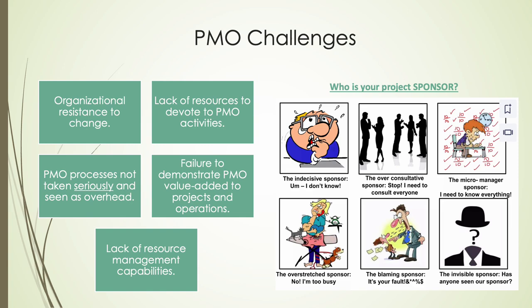Another challenge is sponsor stereotypes. We've all faced these sponsor archetypes. Like the indecisive sponsor, "I don't know," and the solution for this is to offer data-driven recommendations. The over-consultative sponsor, "let's ask 50 people," and this won't end, then the solution is pre-aligning with key stakeholders upfront. As for the micromanager sponsor, the "CC me on everything" type, the solution is automated dashboards plus scheduled updates. Finally, the invisible, ghosted-us sponsor, the solution is to tie sponsorship to their KPIs. Diagnose the type early, and adapt your engagement strategy.